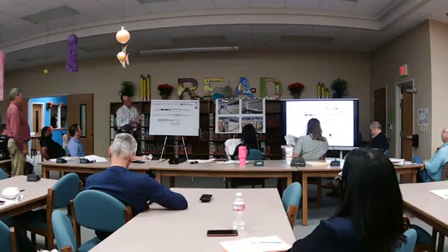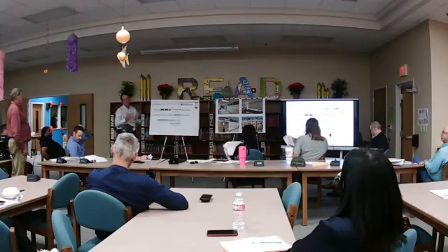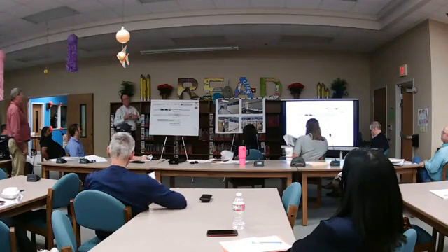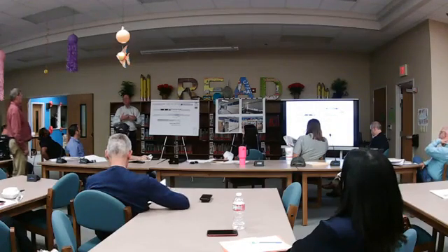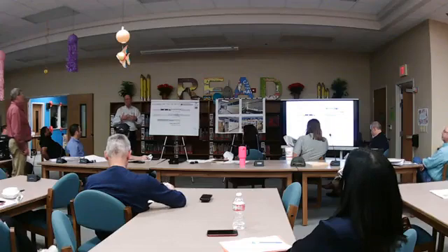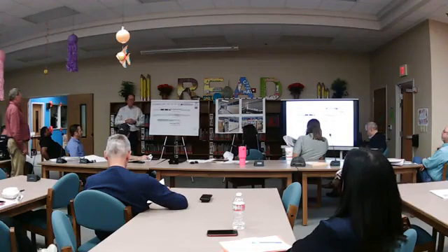But what I like about it is when we go in there, we're not gonna have to tear out something twice. We've talked to the asbestos removal guys, and basically we're gonna be able to cover that outside before they go in and start stuff under the wall.